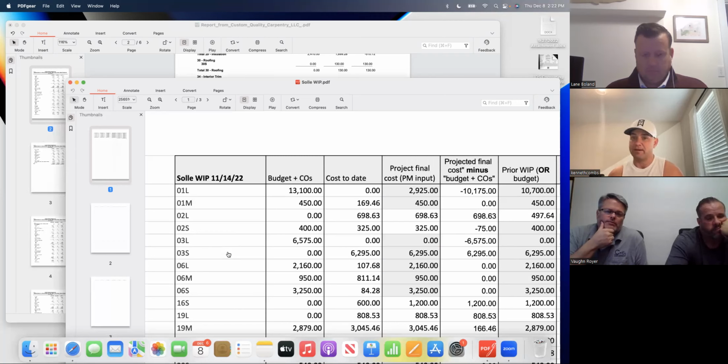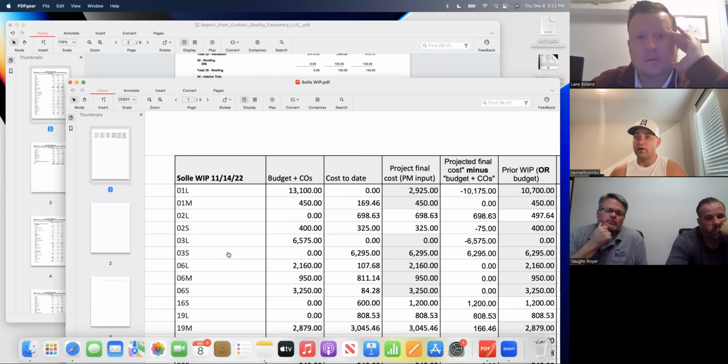Sometimes my PMs will just take the easy road, right? The easiest thing to do is take a $10,000 estimate you already got from the HVAC guy and say, okay, here's the job you already estimated for $10,000, roll with it. But if they know they're over on a line item, they might do the homework of calling a different HVAC company and saying, hey, I got this job, I got $8,000 in the budget, here's a scope, can you do it?